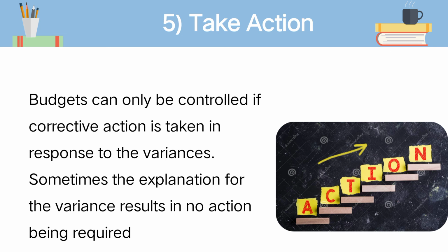Examples of types of action that can be implemented are: reduce or halt expenditure in areas where expenditure is controllable, increase income, make virements, use contingency funds, delay activities, redefine objectives, and redefine eligibility criteria. And next, change the nature of the service and how it is delivered, cease or reduce services. These are the examples of types of action.